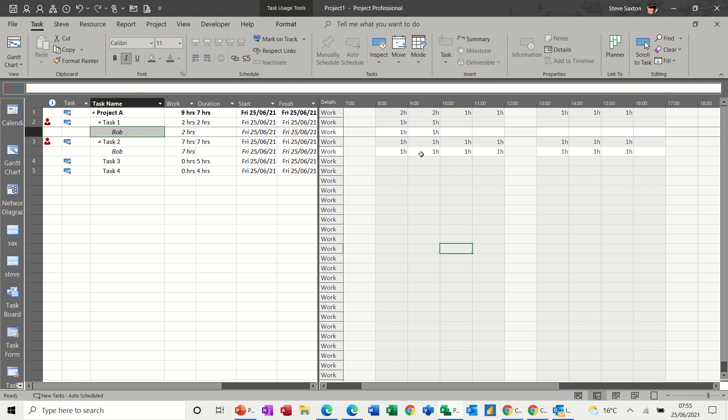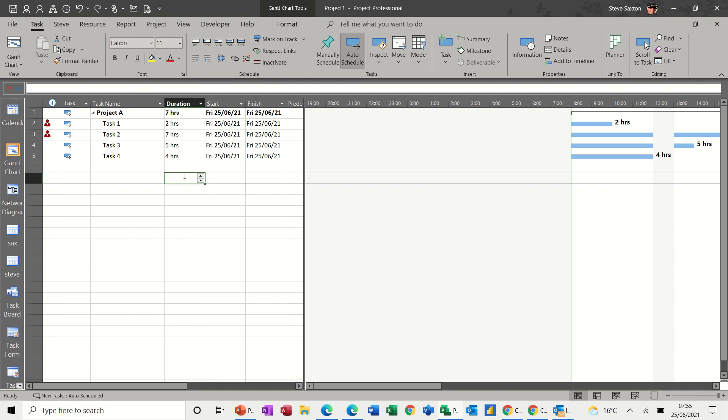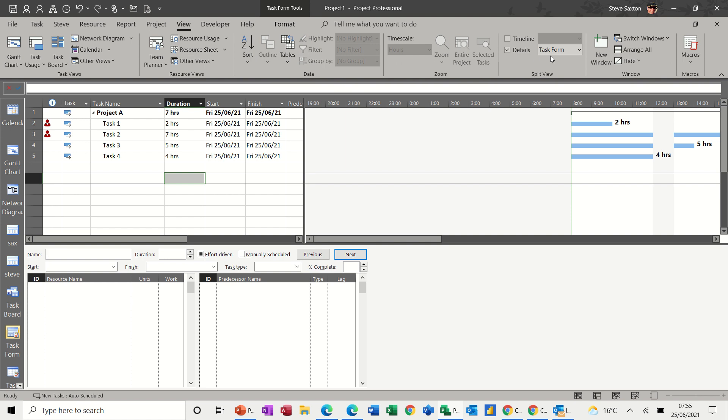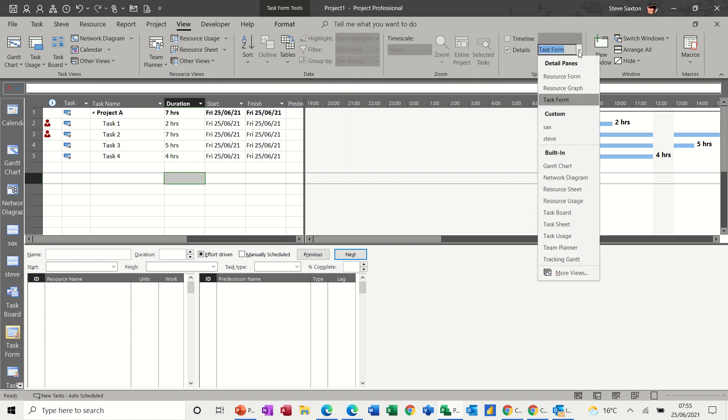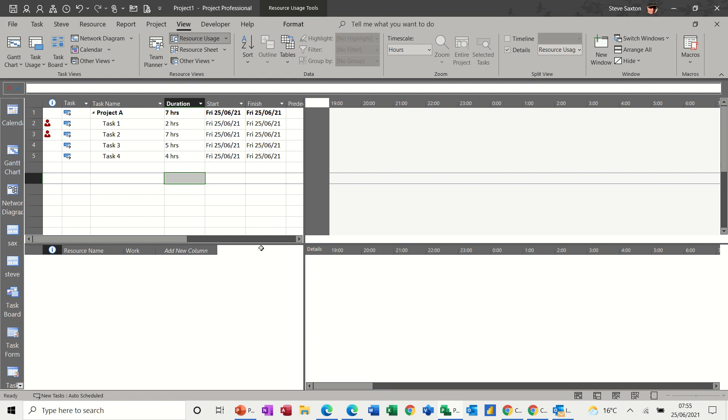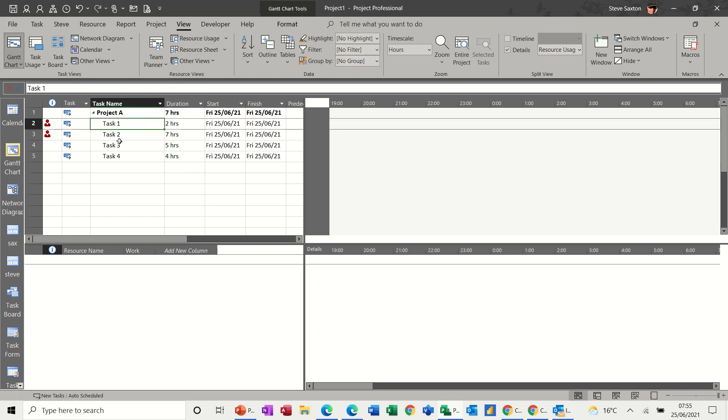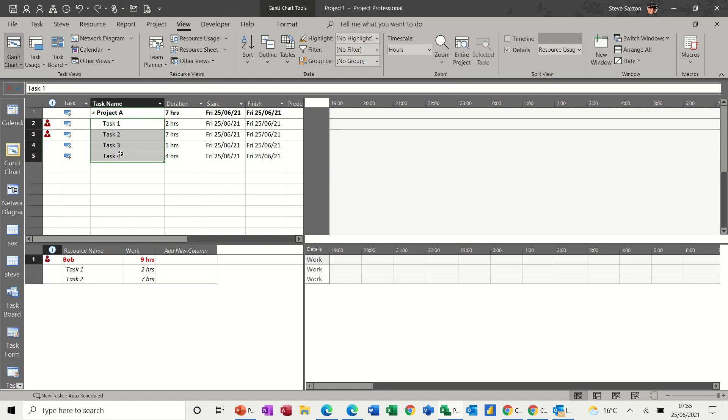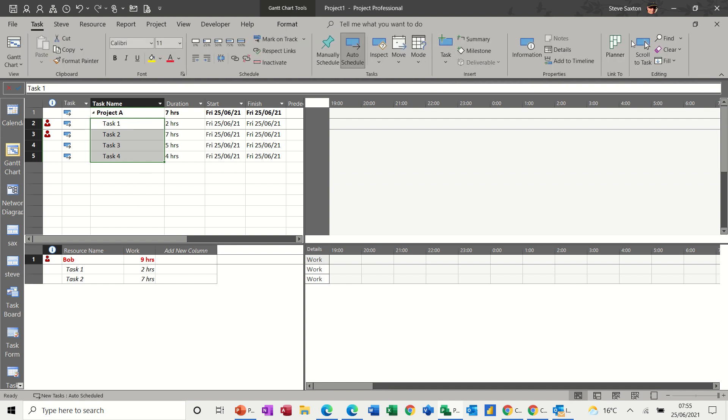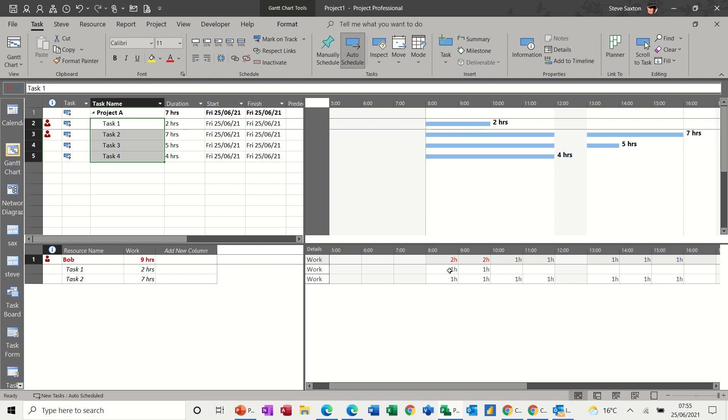You might also want to use this view as a split screen, where this is the bottom part of a split screen. So if I go back to the Gantt, I'll show you what I mean. So if you want to show this as a split screen, just click on details on the view tab, and then change this to resource usage. And you'll get the same thing. So you just basically need to highlight the tasks at the top there. And on this one, well, both of them actually scroll to task. And then that should bring it into view. And you can see the red showing you where your problem is. And that's what you have to fix.